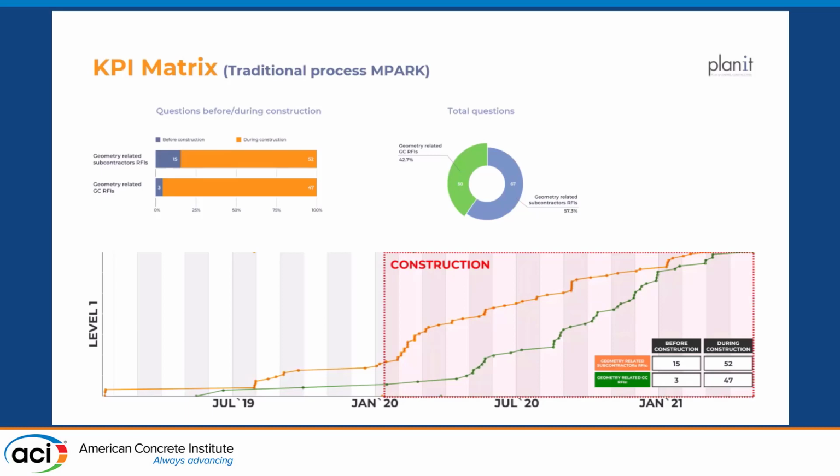When you see this here, we basically list them over time. And you can see that 80% of all the questions are actually in construction. Here are the numbers: a good dozen questions before construction, over 100 questions in construction.